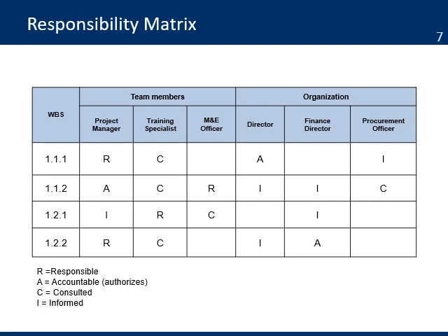Then you can identify people who will be consulted or need to be informed. Notice that there are some empty cells. Not all people need to be involved in everything. The responsibility matrix helps everybody understand not only the responsibilities, but also the activities where they have other roles.